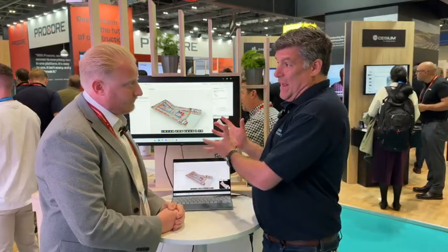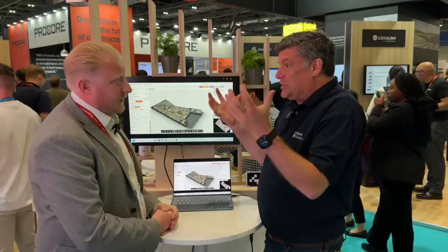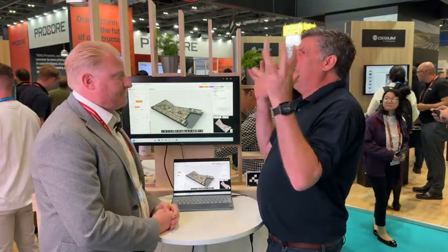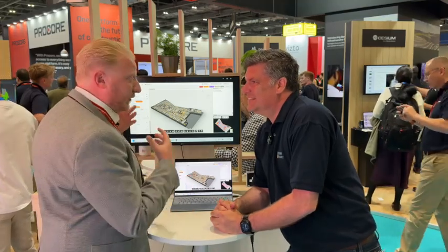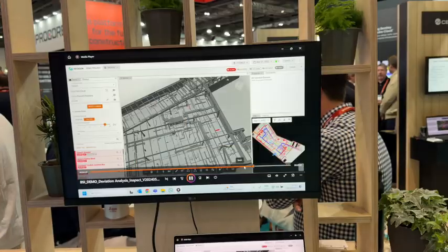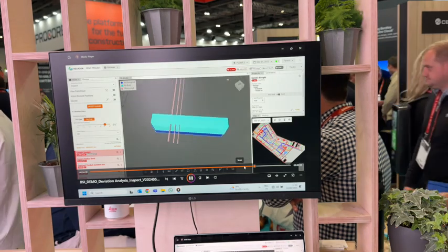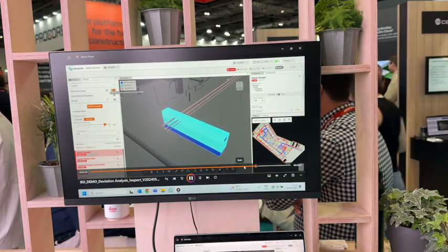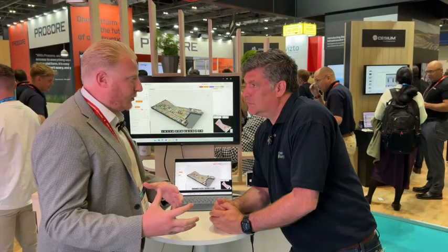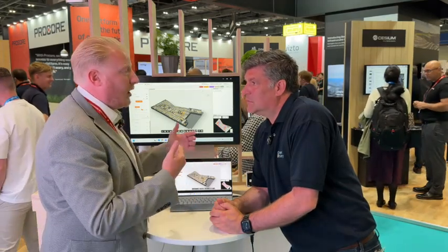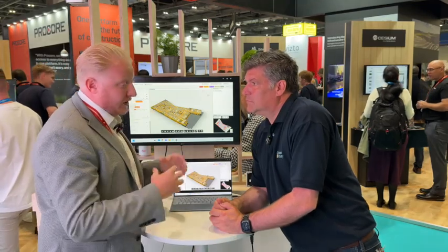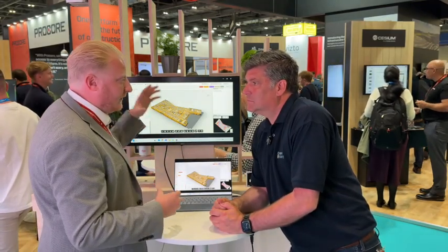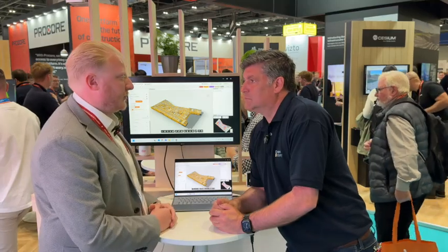But you talked about scanning and stuff like that, but also you can add pictures. So the visual scan, sometimes people want to know, what does it look like? Exactly, and there are 2 different use cases. You've got 360 photo, which is just using a 360 camera, or you've got point cloud data, which is the laser scan data. So for the deviation, your laser scans are there. For your progress reporting, just giving you percent complete, that's where you use the 360 photos compared to the program essentially. So all bolted up within one platform, delivered online, usable for everyone within a project essentially.